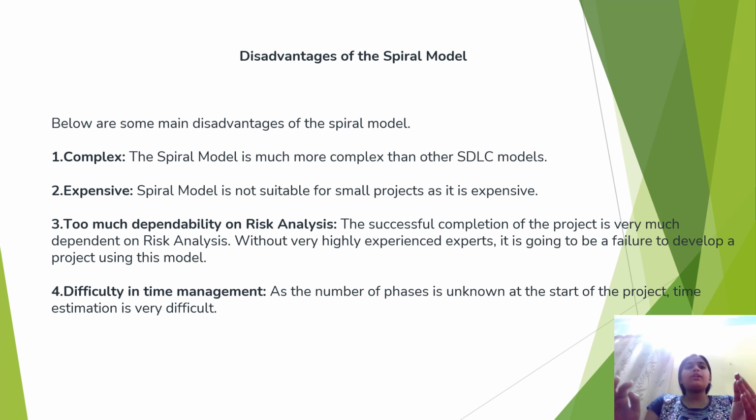Too much dependability on risk analysis. The successful completion of the project is very much dependent on the risk analysis. Without highly experienced experts, the project is going to fail when developed using this model. Difficulty in time management. As the number of phases is unknown at the start of the project, time estimation is very difficult.